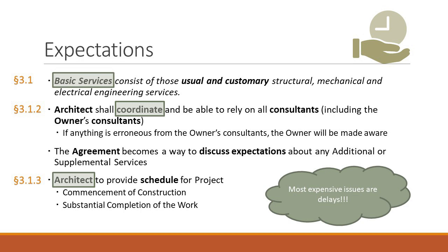So that's where it says the schedule shall include the expected or anticipated commencement of the construction, when construction starts, and the substantial completion. When can I get in and start making my toys? And the architect has to do that. As you know, things can change, but at least the parties have it in writing, and at least some expectations are going to be established.